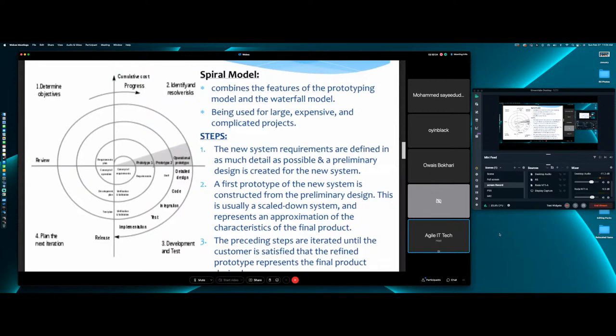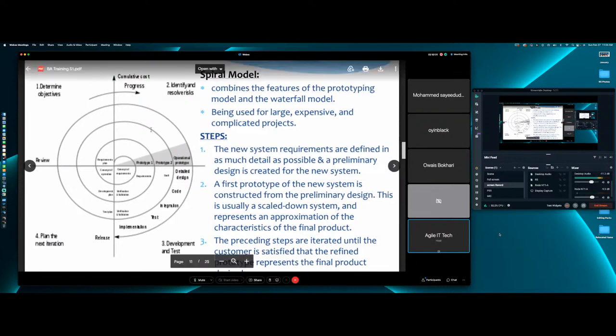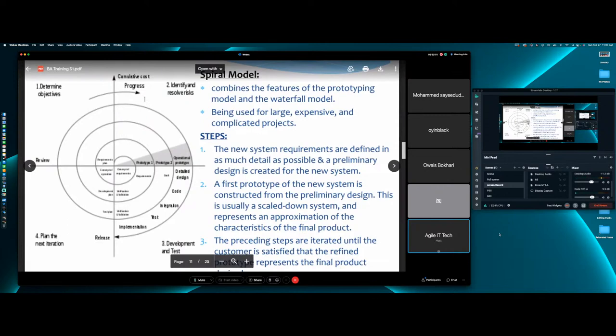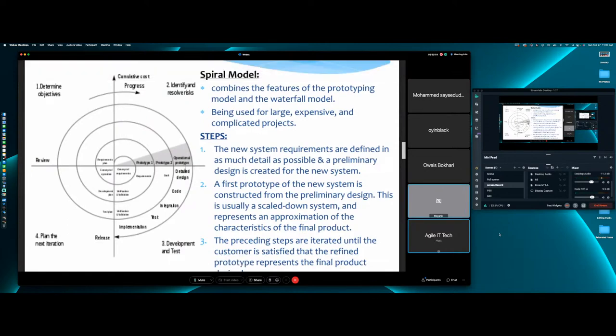Then we iterate and build on top of prototype number one, and we go around the block one more time, and the output is prototype number two. And then we repeat it. So every prototype is released to the business stakeholders until, in the third round, we repeat ourselves and wind up getting an operational prototype. The one that has enough functionalities built on top of it so that we can code, integrate, test, and implement each cycle and release that operational prototype. You got it?